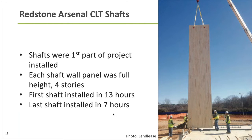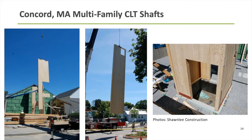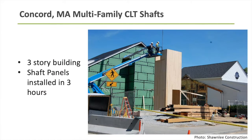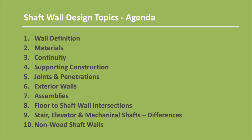Compare that to forming up a four-story tall shaft enclosure using other materials — you can definitely see some potential cost and schedule savings. There's one more example: a multifamily project in Massachusetts with three-story tall CLT shaft walls. These were erected from when the panels got on site in the morning till lunch — just about three hours — and all of the mass timber shaft walls in the project were installed. That highlights the opportunity that new products like mass timber bring for speed of construction.